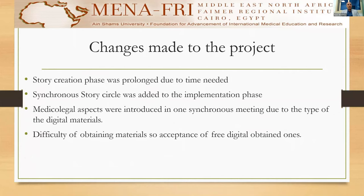Changes made to our project include extending the story creation phase, which was originally planned for one week but took more than two weeks. A synchronous support circle was added to the implementation phase. A medical-legal aspect was also introduced in one synchronous meeting regarding the type of digital materials used, as some students used real patient names and photos or videos.